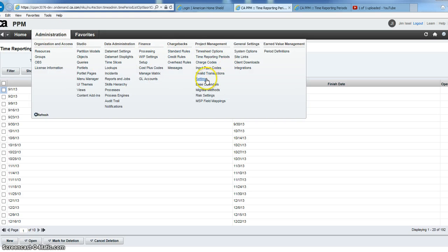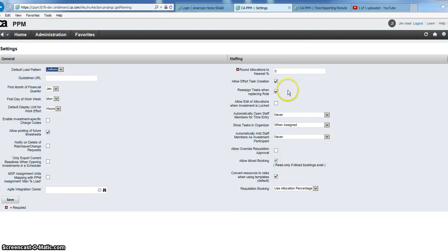Let's see, what else do we have? Under project management, we have settings. Most of these have to do with using Clarity for building out elaborate project plans. So if I stretch a task over 3 weeks, but it only has 8 hours of effort, the first option here is how do I load in those hours over that time period. Uniform means I'd take 8 hours and uniformly distribute it over 3 weeks.